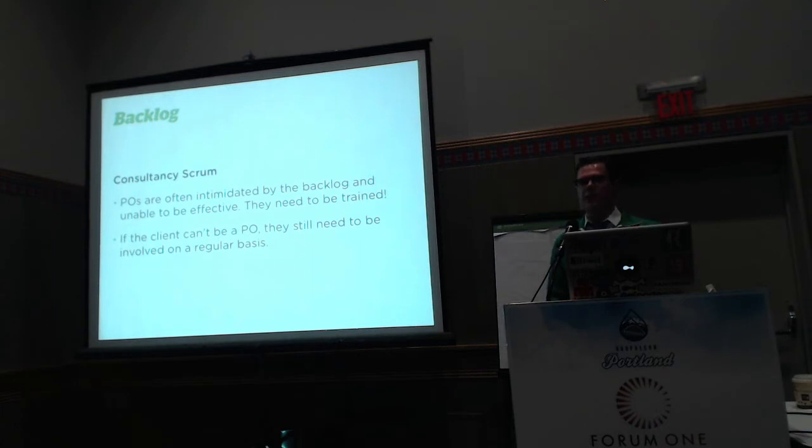It doesn't mean that there are 5 things that are high priority. It means that there's something that is up here, and there's something below that, and something below that, and something below that. No 2 things can ever have the same priority. And that really messes with some people's heads, because they think it's all important, but in fact, that's not really the case. So they have to understand that prioritization means everything is more or less important than something else, period.